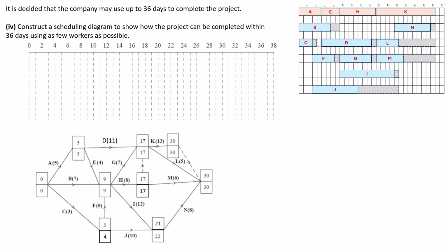So I have our cascade chart up there on the right, and I have our activity network down there on the bottom. So some things you need to keep in mind is what order should the activities be done in. So I'm going to group my activities into a few different groups to make sure I don't accidentally schedule to do something that can't be done yet.